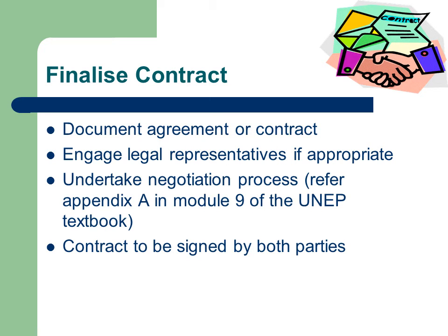All agreements with vendors must be documented and signed by both parties. A contract is a binding agreement which often contains information sensitive to both parties and therefore must be carefully planned. For smaller items of procurement, the formal agreement may be between the project manager and the client. For larger procurements, or where there is a formal tender involved, the contract will be negotiated at a higher level of the organization with the participation of legal personnel.